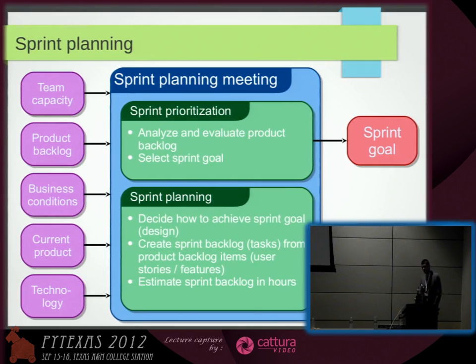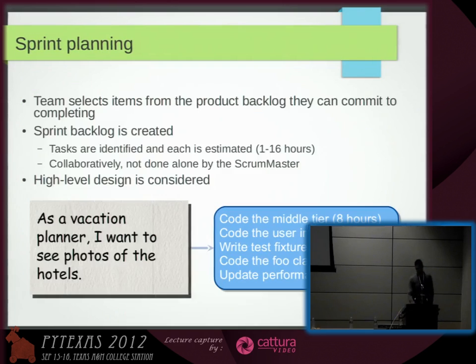The next outcome, which takes a little bit longer, is when they decide how to achieve all these goals, and basically they are breaking down these features into tasks. And tasks get hours assigned to them, which means there should be some estimate of the time associated with each task. Once they do that, they can figure out that maybe they took too much or too little. Usually you want to leave some reserve so that when new things arise, you have some reserve time for that.